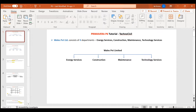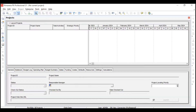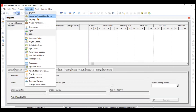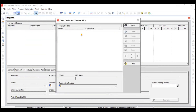We'll understand this through Primavera P6. To create EPS, go to the toolbar, click on Enterprise, and then select Enterprise Project Structure without expanding the menu. You'll see there is no EPS yet because we are freshly starting in Primavera.